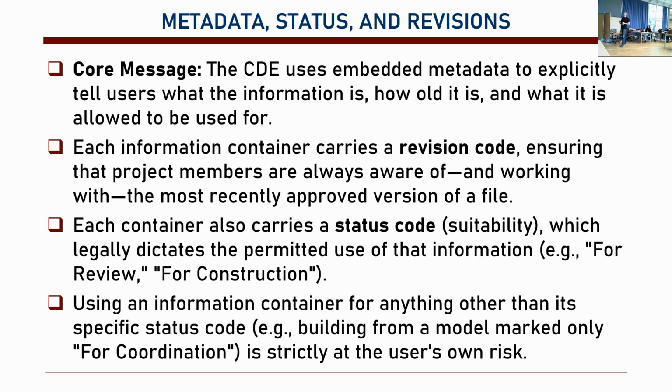Each container also carries a status code. How suitable is it? And what is it for? Is it for review? Is it for construction? Basically, the information container is only used for the particular reason that is put there.